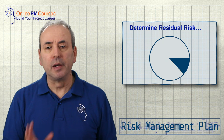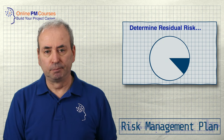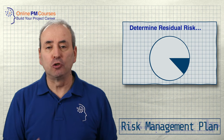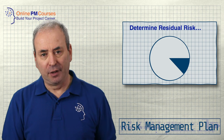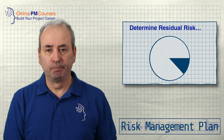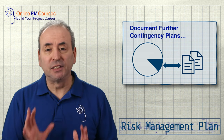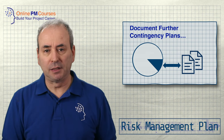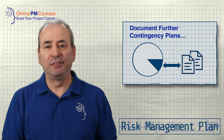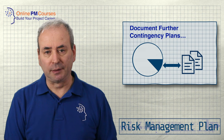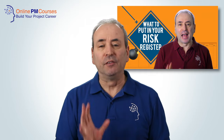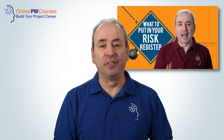When you've done that, step seven is to determine the residual risk. Does your management plan address the whole risk? If it doesn't, what is left and how much of a threat is that? If a residual risk remains, step eight is to document your contingency plans that you can put into action if any of that residual risk materializes. So the process for creating a risk mitigation plan is straightforward — eight steps you can follow for each risk in your risk register.